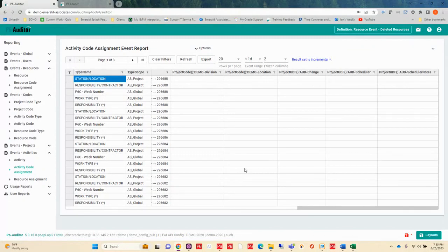The old project, the one that didn't have resources, you don't want to delete because it totally removes it from the tables. So you would want to restore everything first, from the time you took your backup up to the time where you actually found that there was a problem.